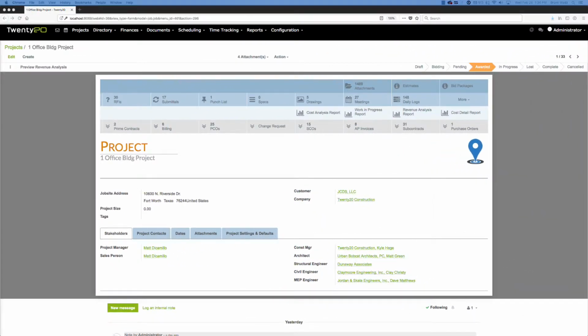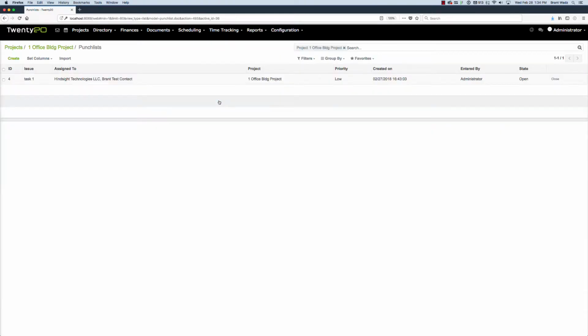Okay, in this video, we want to focus on the punch list. As most of you know, a punch list is a way for us to keep track of items on the project, tasks on the project that have not met the contract specifications. So we can track all of these punch list items by starting here in the project portal and clicking on the punch list smart button. This will take us to a list of all of the punch list items that are on this particular project.